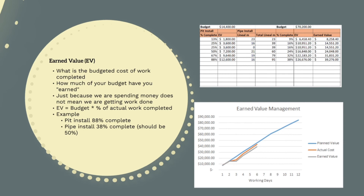For pit install, we've installed one pit and completed 75% of the second pit, meaning we've completed 88% of the overall scope. The earned value of the pit install is then $14,400 by 88% equals $12,600. For the drainage pipe install, we've completed 38% of our original budget, which was $70,200, meaning our earned value is 38% of this, which is $26,676. When we sum these together, we get an overall earned value of $39,276.